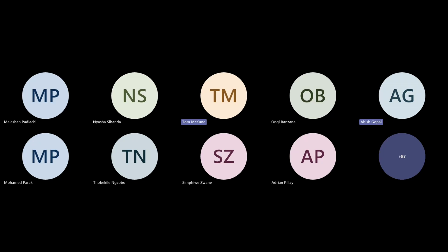Okay, then there's a question from Isaac in Gwenya, and just out of interest, he wants to know, did you have to have an EIA, or were there any triggers for NEMA on these rehabilitation works that you've presented on? Okay, so out of interest, this was an emergency rehabilitation project. It underwent a special Section 31A application, and that negates certain timelines.